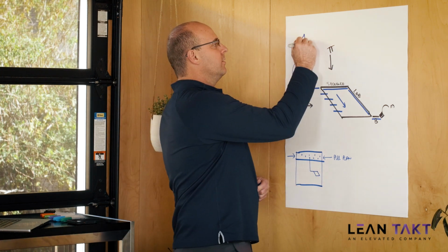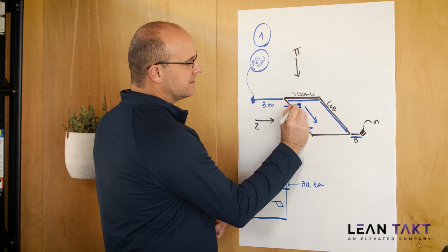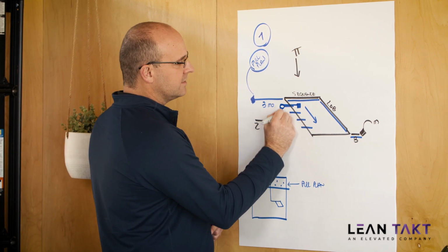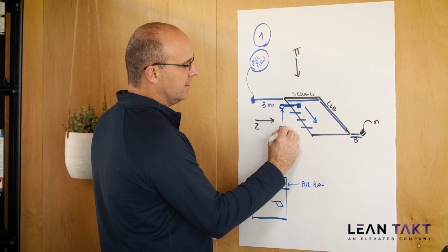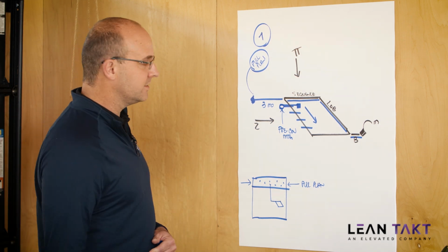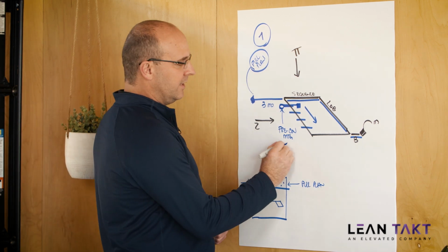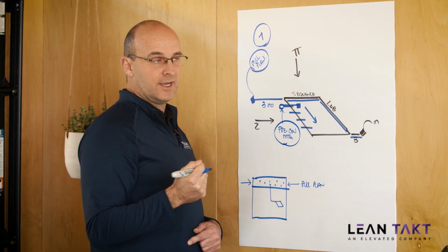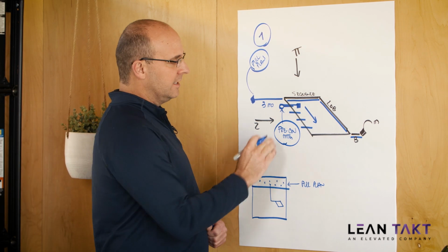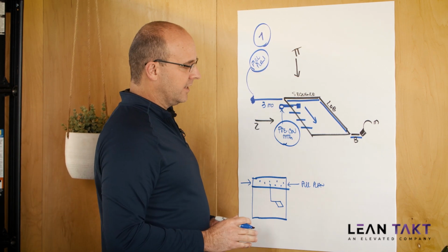That's habit number 1. Habit number 2, which is key for me, is if you have a wagon in here, and this is a high-risk feature of work, 3 weeks ahead, you're going to want to do what's called a pre-construction meeting. This is where you take the owner, the inspectors, the stakeholders, the project team, the trade partner, superintendent, PM, and foreman, whoever needs to be there, and you make sure that everything is gathered to do that work right, and that quality expectations are set, and that we now have a quality checklist or visual that can be used to install the work. This is going to prep all of the work for each of the wagons, and that is your pre-con meeting.